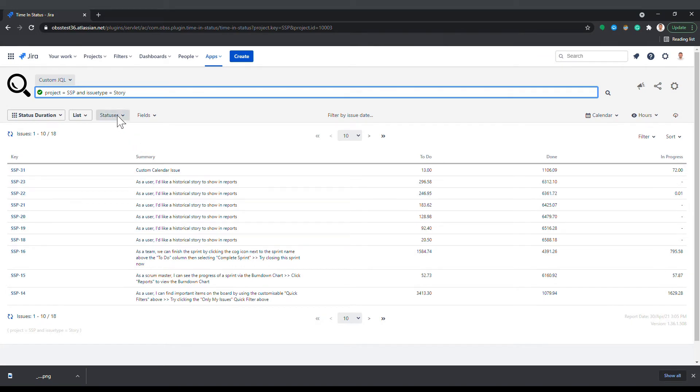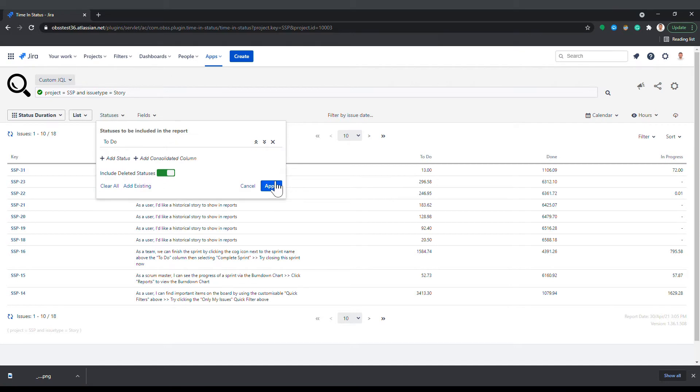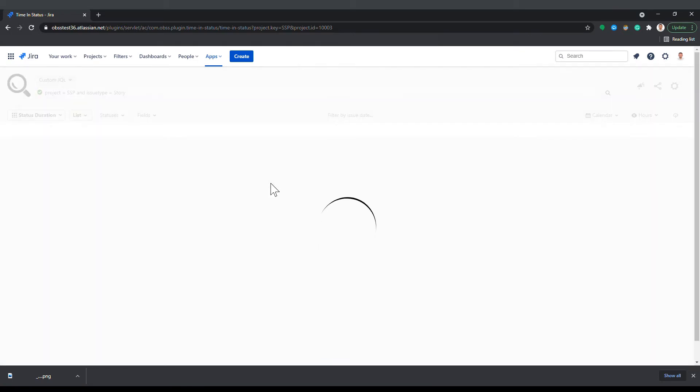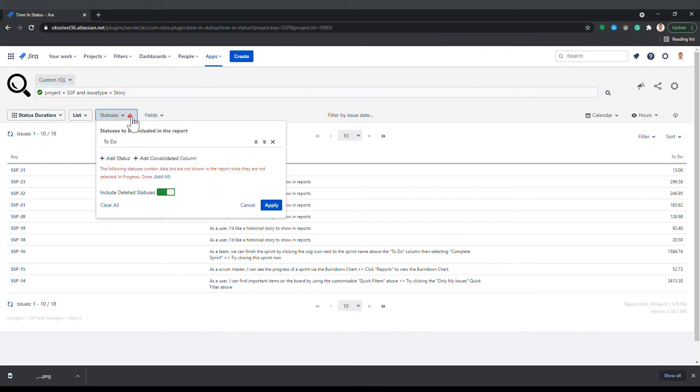If even only one status is selected, timing status will only show that status as a column and exclude others. In that case, status panel will show a warning that says the following statuses contain data but are not shown in the report since they are not selected.